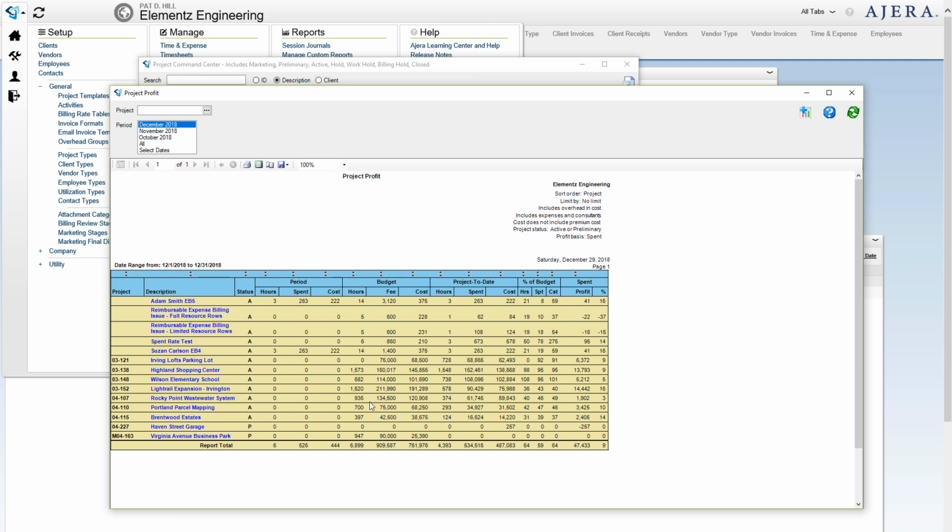Where this gets to be really interesting is after you've closed a dozen matters for the same case type. You would run a filtered version of this report for those dozen cases, and it's going to show you how much time it takes to actually complete that case type.